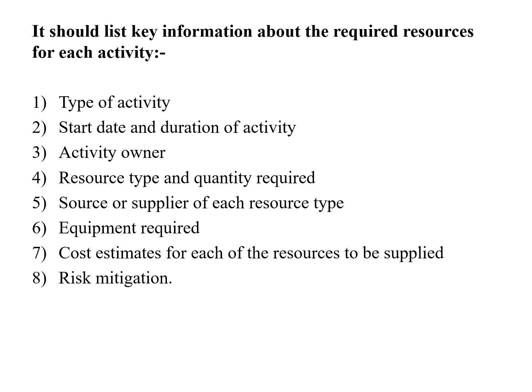See, sometimes you have to hire and you have to keep it for the future also. Sometimes the materials you have to hire and keep. Not everything. See, cement you can store with a limited quantity. You cannot store it for an entire 1 month, 2 months, 6 months. If you want to store that, you have to take precautions. Otherwise, the whole material will be wasted. Because of that reason, it is important.